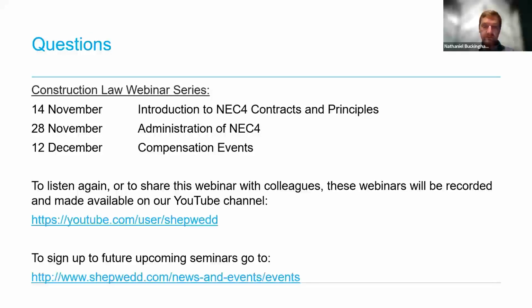The first question I'll answer is whether dispute resolution boards can be used in the UK. We said W3 is the option that introduces dispute resolution boards, and that is for use when it's a non-UK project. So strictly speaking, if you just pick option W3, it doesn't really work in the UK.